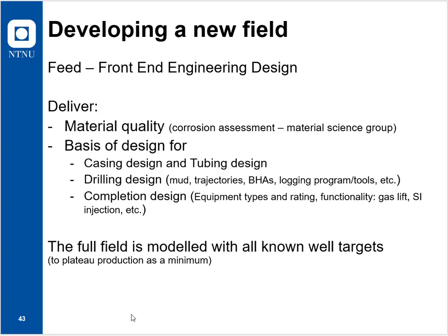So having an overview of what you're going to need and purchase, that's what you need in order to do the contracts, and the contracts need to be in place at least 1 year in advance because of the lead time. So there you have planning backwards: 1 year delivery, half a year for the development of the contracts, and I don't know how much time in order to get all these designs in place. Then you have the time aspect of it.